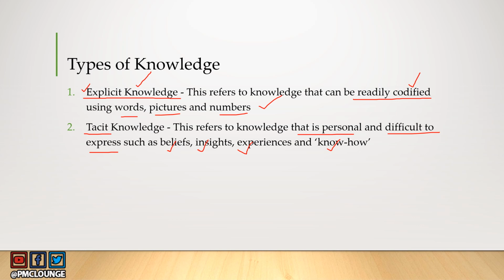This is explicit knowledge. Second is tacit knowledge, which could come in from your experience of dealing with the security team, where you got to know that this team does not respond to emails frequently. They are very, very irregular. So this is tacit knowledge, because this is your experience. You cannot be 100% sure that they will provide you status updates. You are not 100% sure that they are going to respond to your emails, because that has been your experience of the past 5 projects. So this is tacit knowledge. It cannot be codified, but the requirement of 2 weeks is something which can be codified.